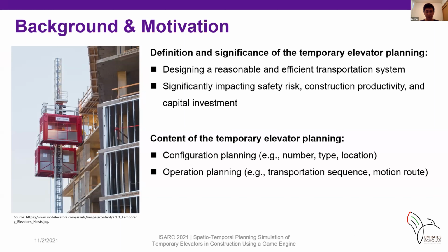One is configuration planning, which refers to determining the number, type, and location of temporary elevators. The other one is operation planning. It determines the transportation sequence and the motion route.